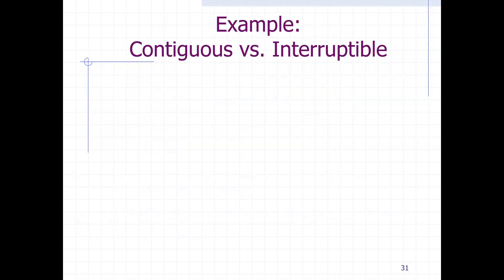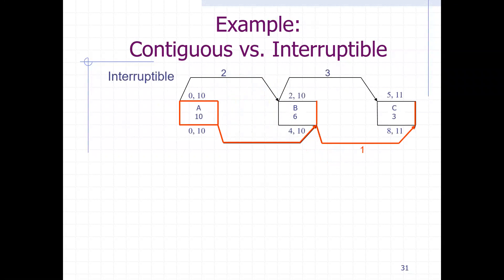So we've talked about the interruptible and contiguous activities, but let's actually understand the differences between them and how do we utilize them. So for the interruptible activities, as you can see from this slide here, A is completely critical activity, but B has a finish restricted date. In other words, B must be completed at 10.